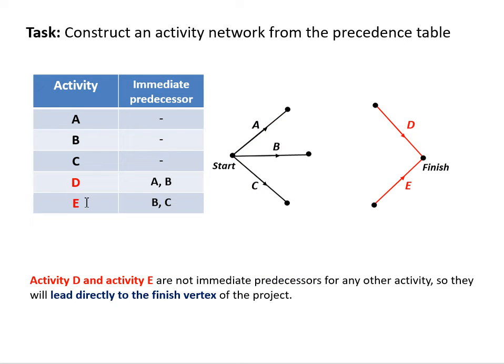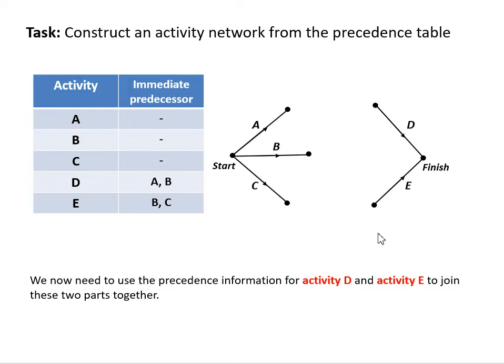At the other end, we can see that activities D and E are not listed anywhere in the immediate predecessors, which means nothing relies upon them to be completed before the next activity can start. So these D and E activities are actually our finishing activities. Now we just have to look and see how we connect these three starting to these two finishing activities, using this precedence table.